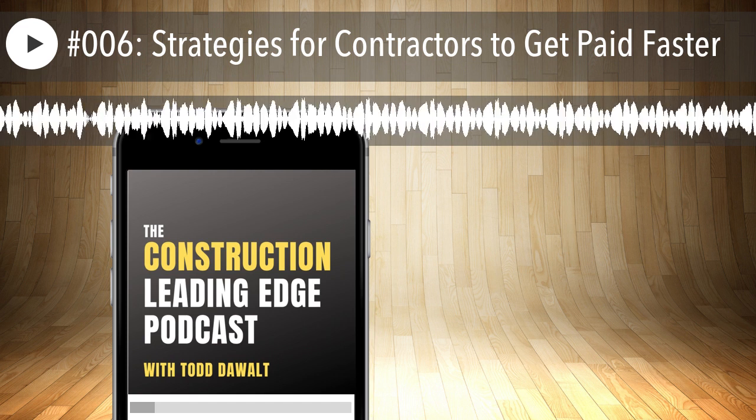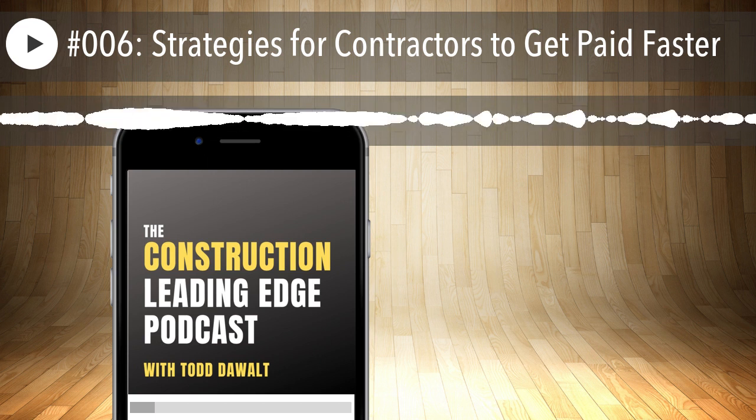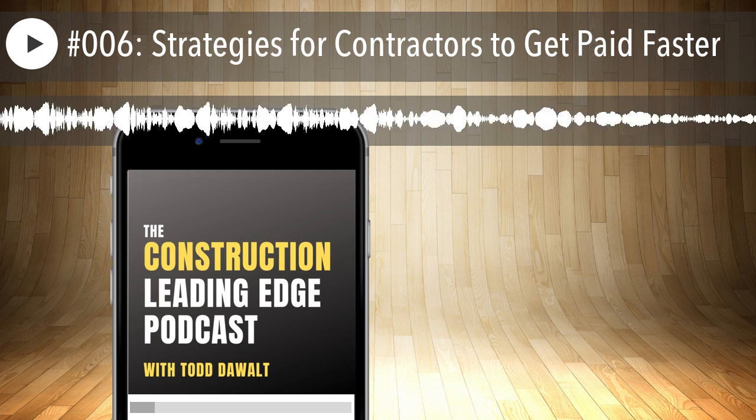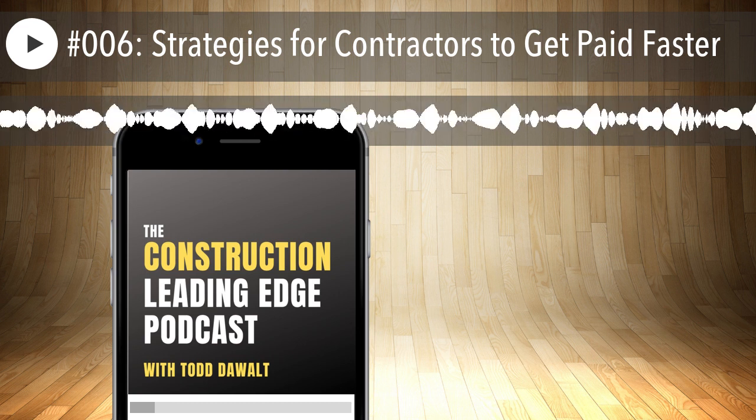It may seem like overkill, but in a lot of cases it'll save you problems. If you have an issue, then you're dealing with 1 week, not 1 month or 2 months or whatever your pay request may be. The electronic format makes it much easier to search for errors. And doing this weekly ensures that the issue is still in someone's short-term memory.